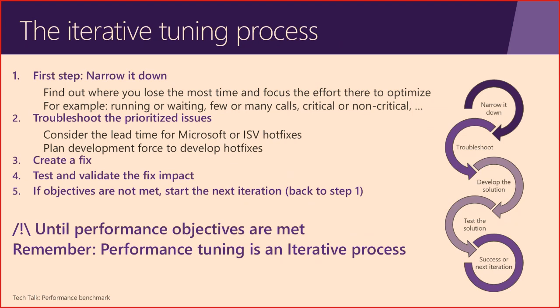very obvious issue to fix, you will then work on the prioritized issues to develop a fix or request it to Microsoft if it's a standard bug, or to the ISVs. You will get those fixes and you will test again. In the report, you will then see if now you can achieve the objective or not.